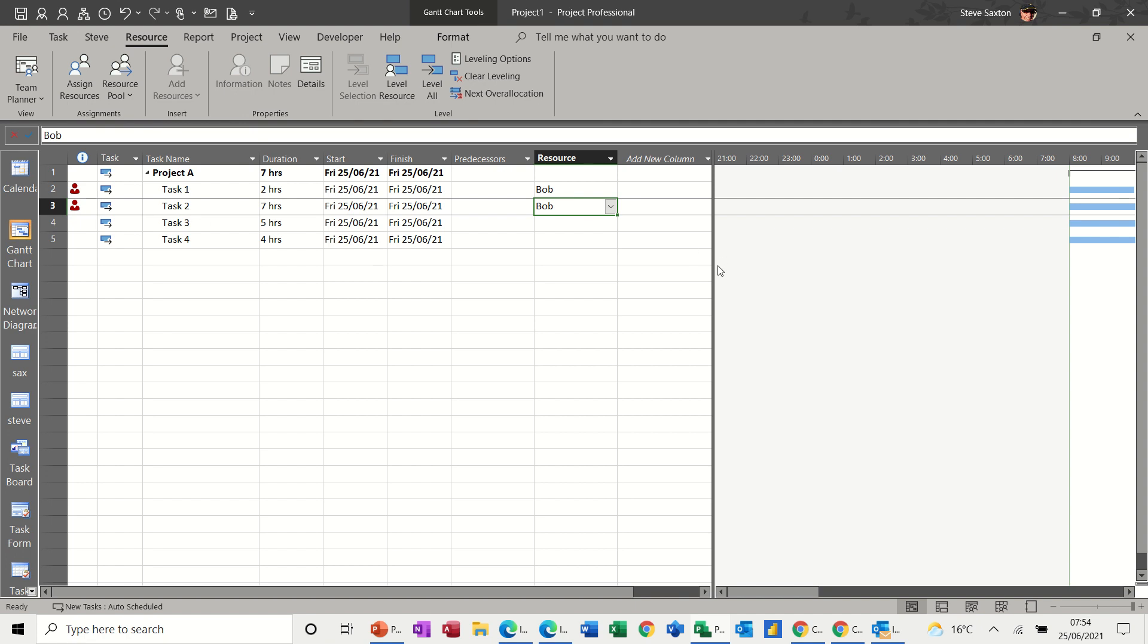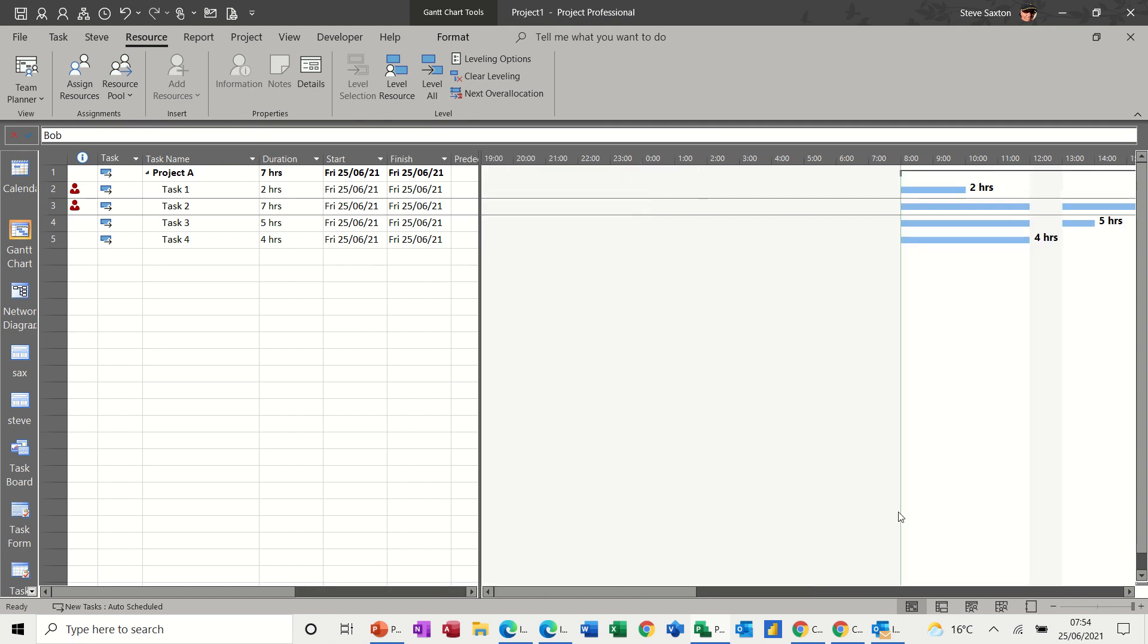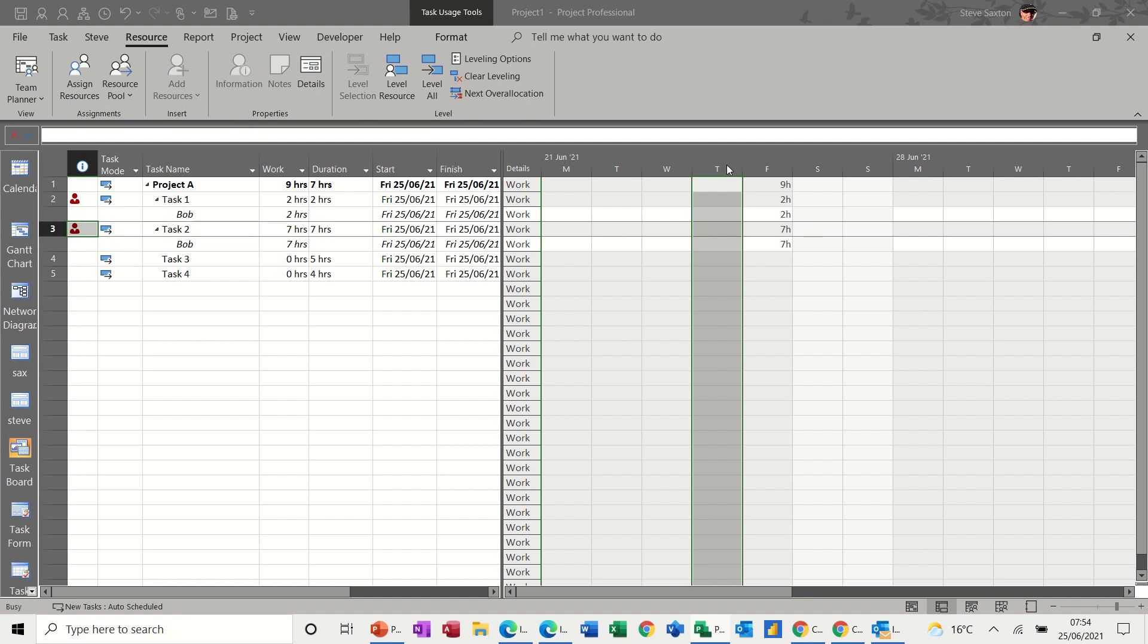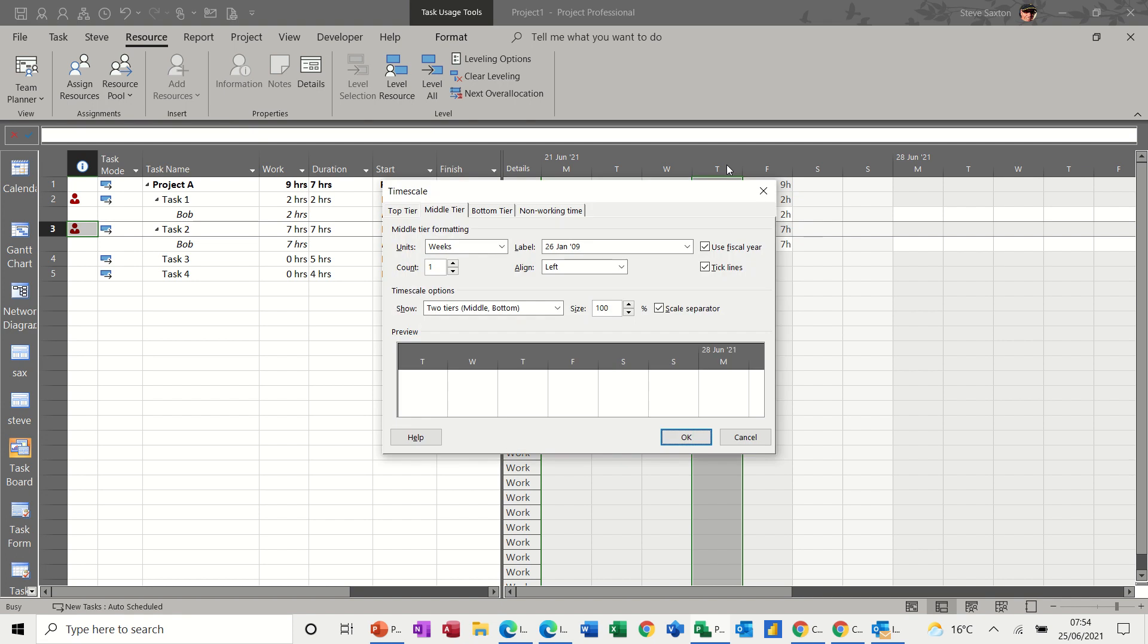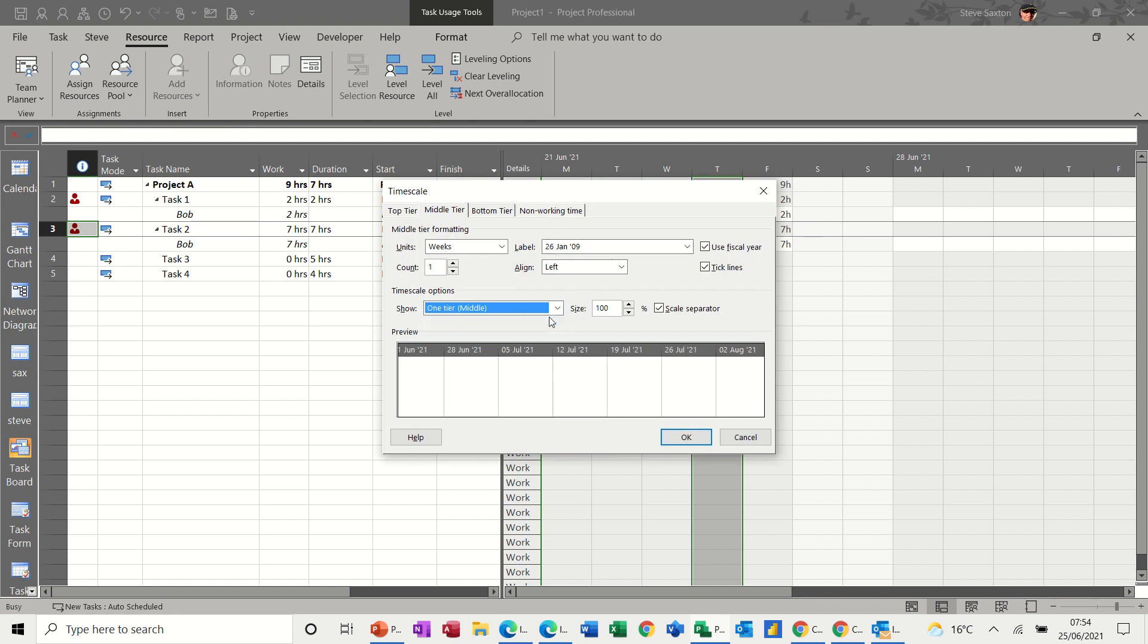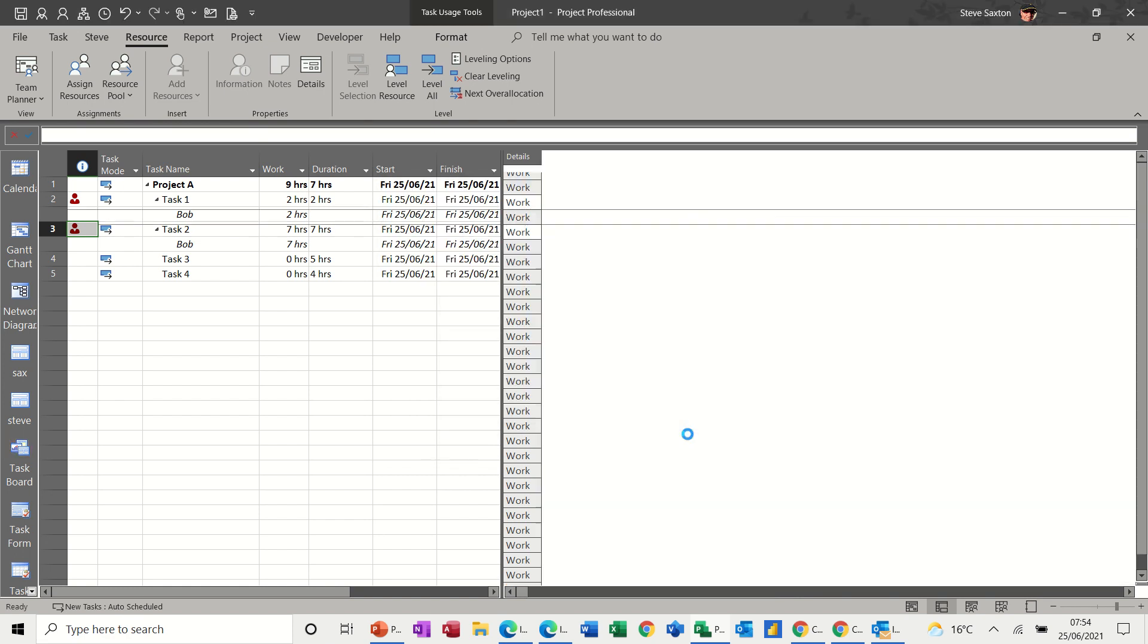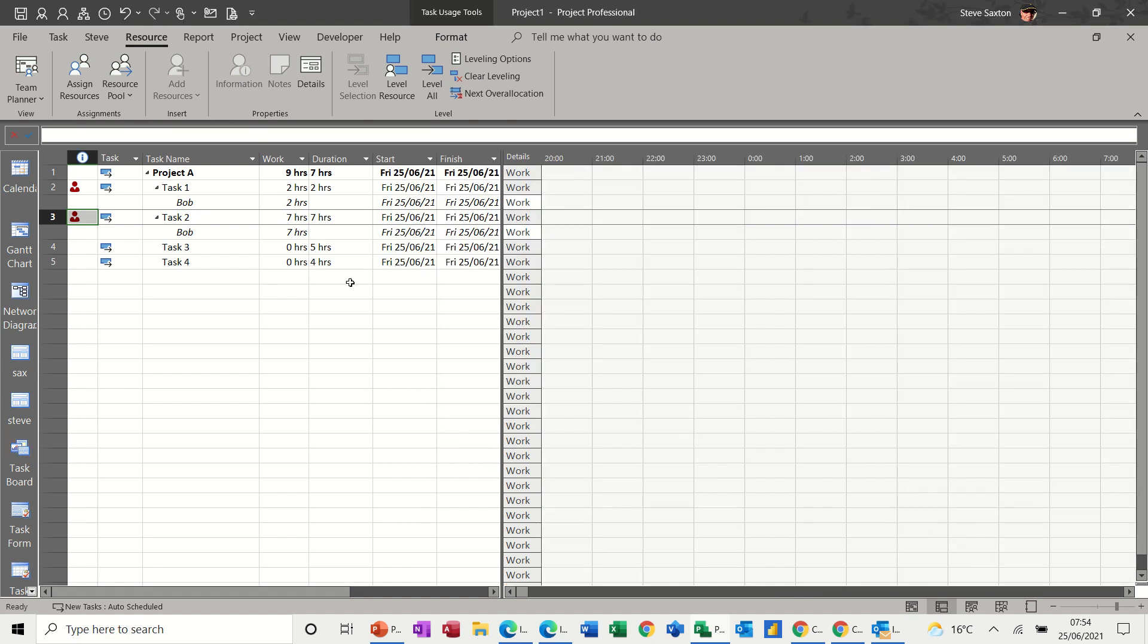Now, if you want to look at that in task usage view, you can go down to task usage, down the bottom there, or you can pick it up in the view bar. And again, your timeline is not showing this as the hourly breakdown. So you do exactly the same. Double click on the timeline. Change the tiers to one tier. And then change the duration to hours. And then you'll get the breakdown for the resources in hours.